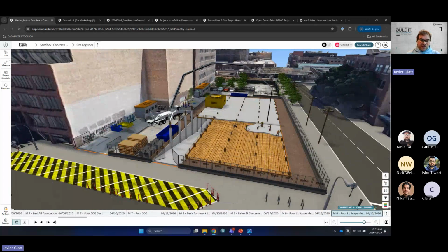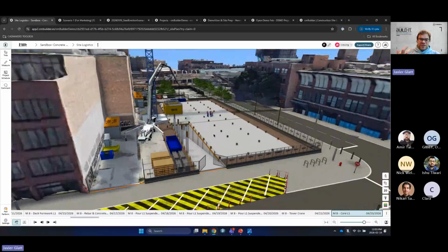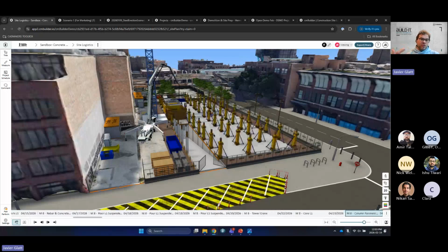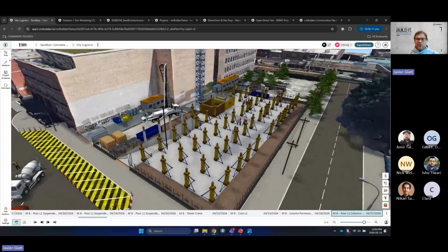The next thing would be the 4D planning. So 4D loosely is the understanding of schedule or program linking to a BIM model, and then for us, tying all your means and methods, temporary works to that all in one place. So you have a full understanding of what's being built, when, and with what context, like what means and methods.